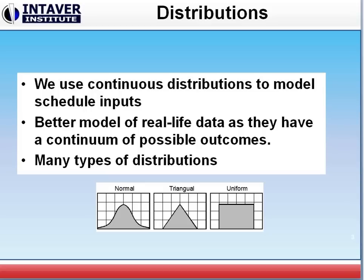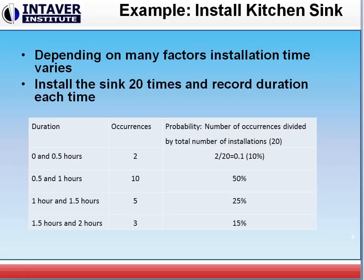Now let's take a look at an example of how we would build a distribution from real life data. If we're going to install a kitchen sink, what we know is that sometimes it will take us a little half an hour. It could take us three hours depending on what occurs during that installation. So we will install it 20 times, and every time we'll record how long it took us to complete the installation.